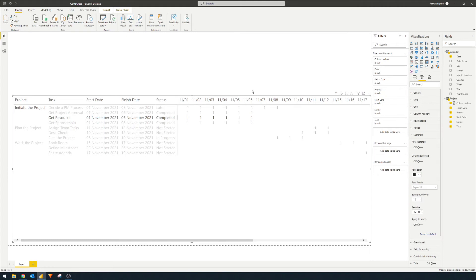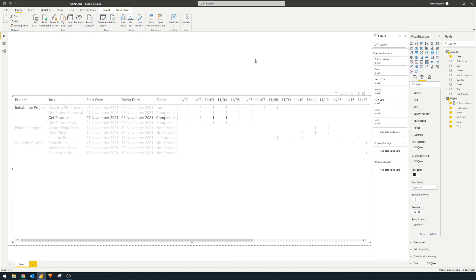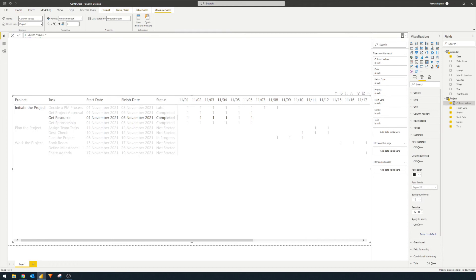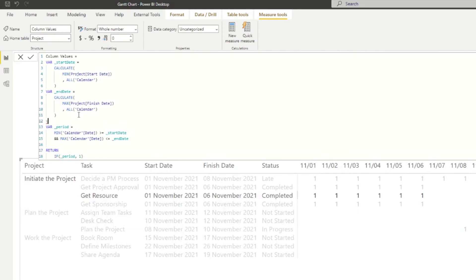The next thing that we want to do now is we want to determine what the color should be for each of those tasks. Now we're using numbers at the moment, because we're going to convert them into colors later. But for now, we need to distinguish which tasks are late or completed, not started or in progress, depending on the status of those tasks. And we want to highlight them accordingly. So for example, if it's complete, we want to show them as green, or if they're late, we want to show them as red, so something like this. So to do that, we need to distinguish the values all together. So we have one, two, three, four different statuses, and we need to distinguish between those four different statuses. So we'll do that in the measure itself. We're going to go back to our measure here, column values.